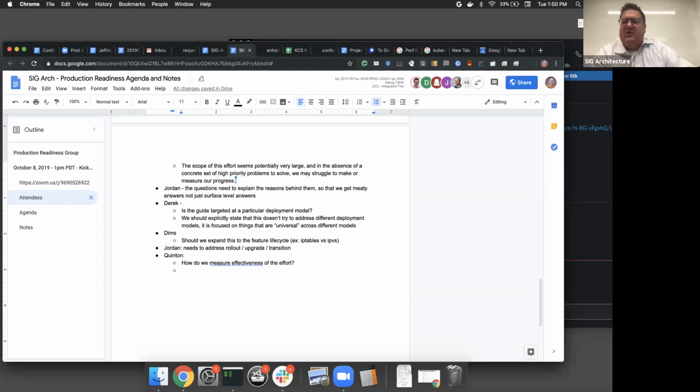Sorry, what you're talking about is actually at design time, right? So there's the set of questions that need to be asked at design time, and then there's hopefully a rubber stamping that needs to be done at promotion time to say, yeah, we actually fulfilled those and the other criteria.